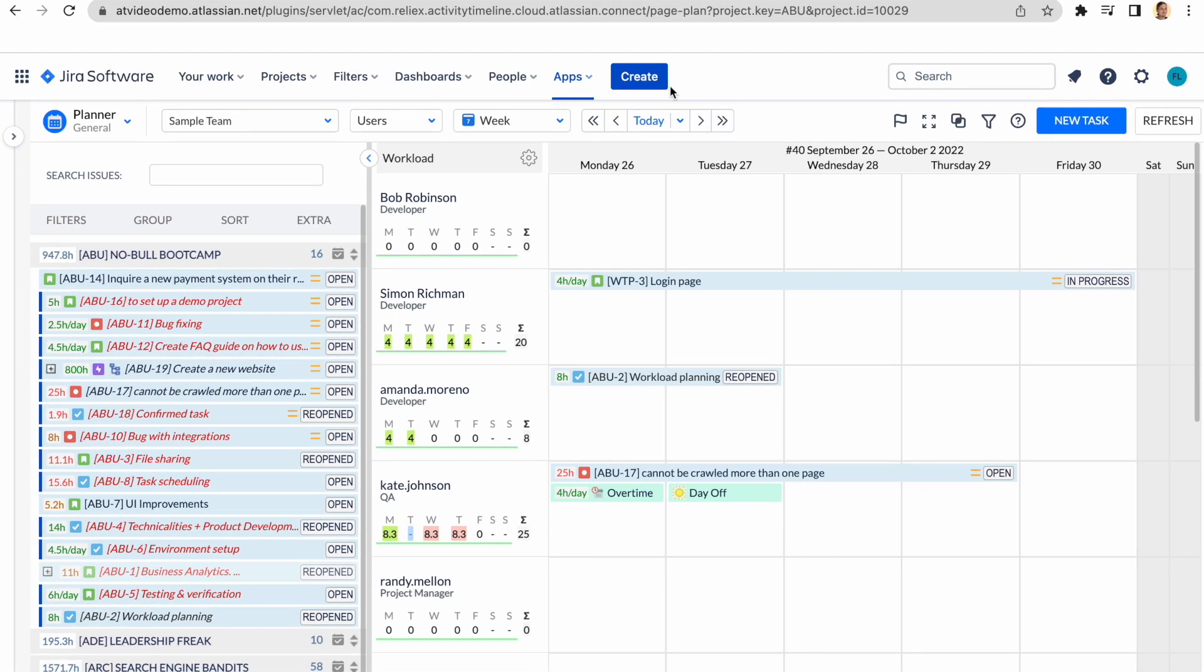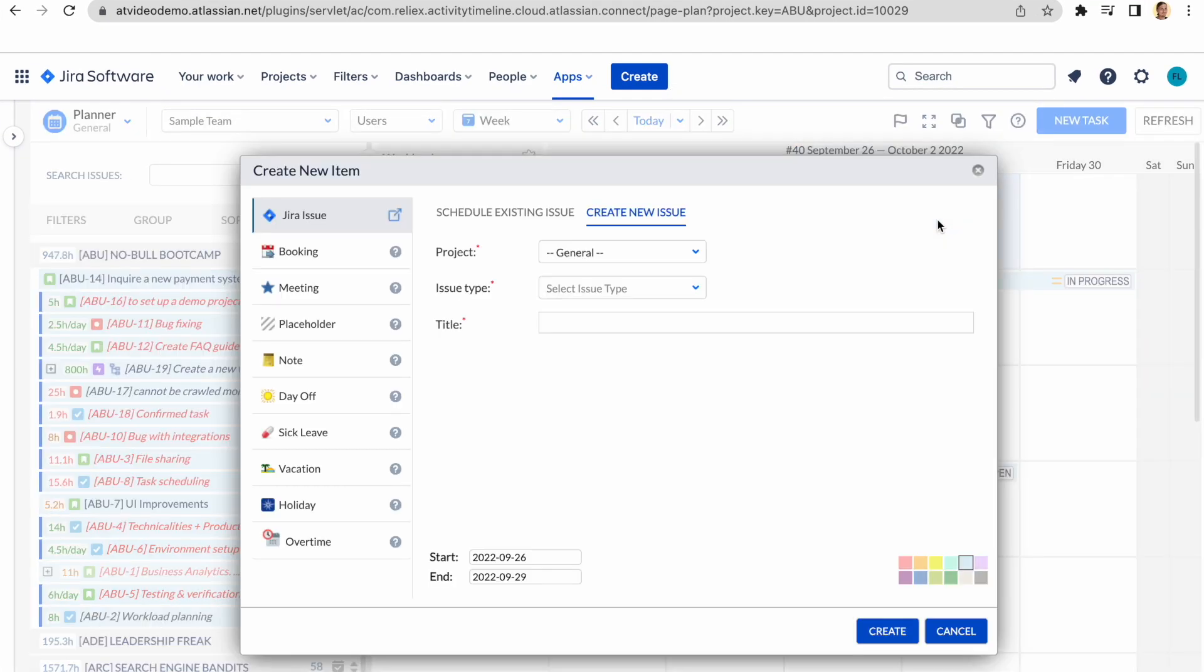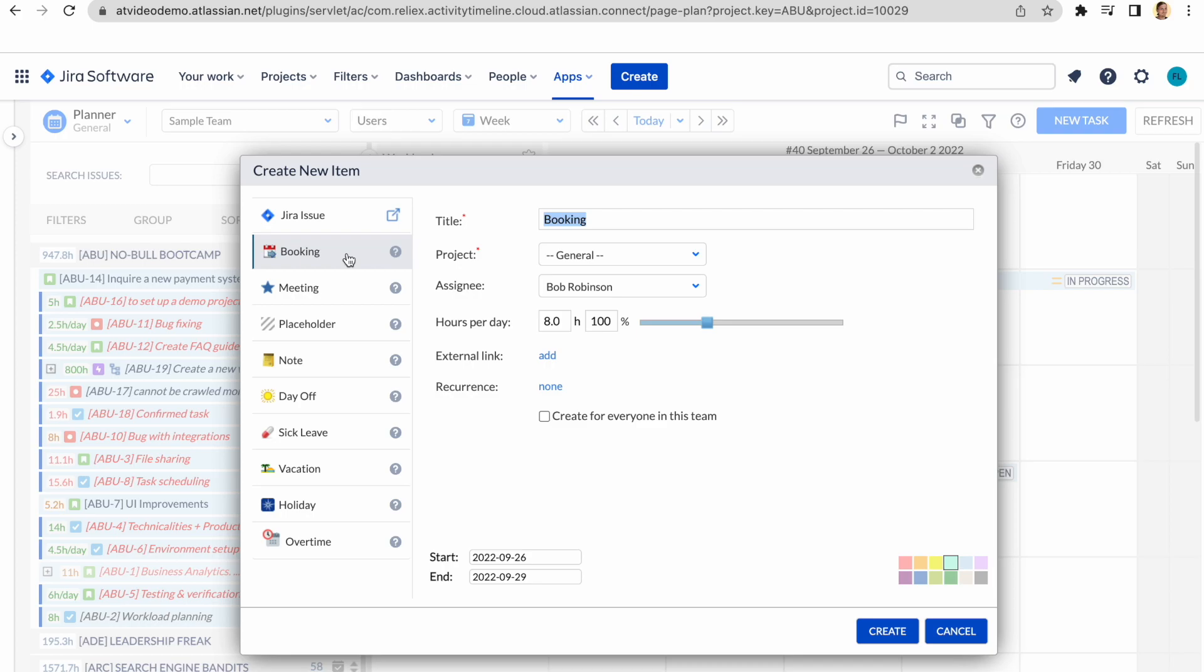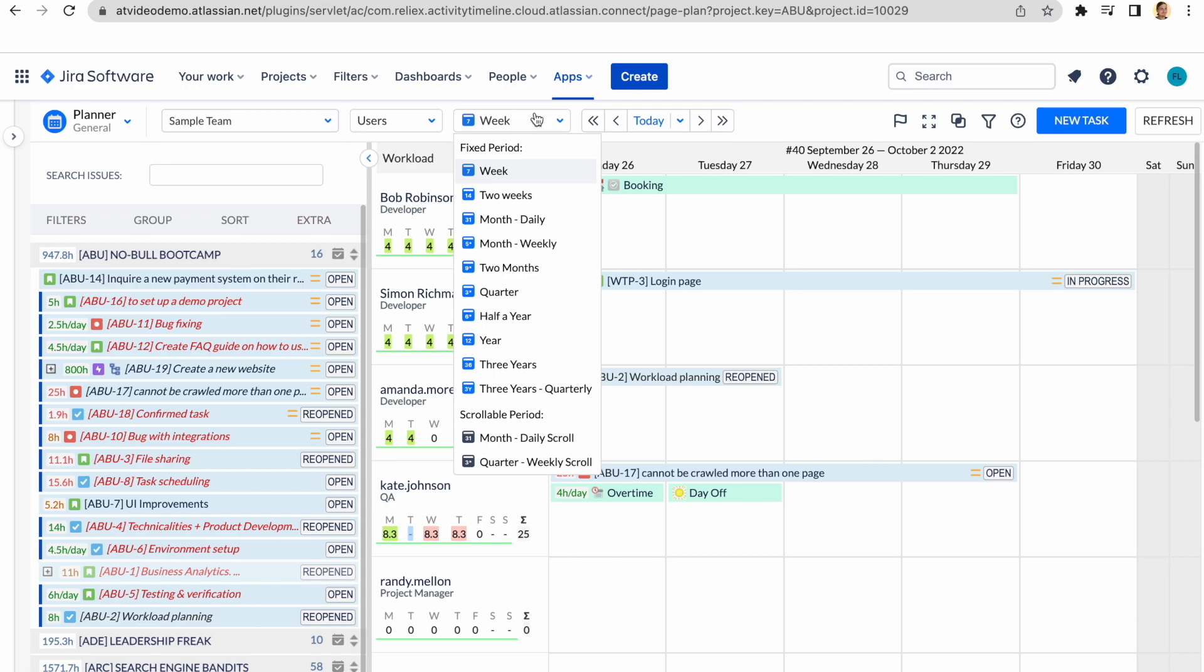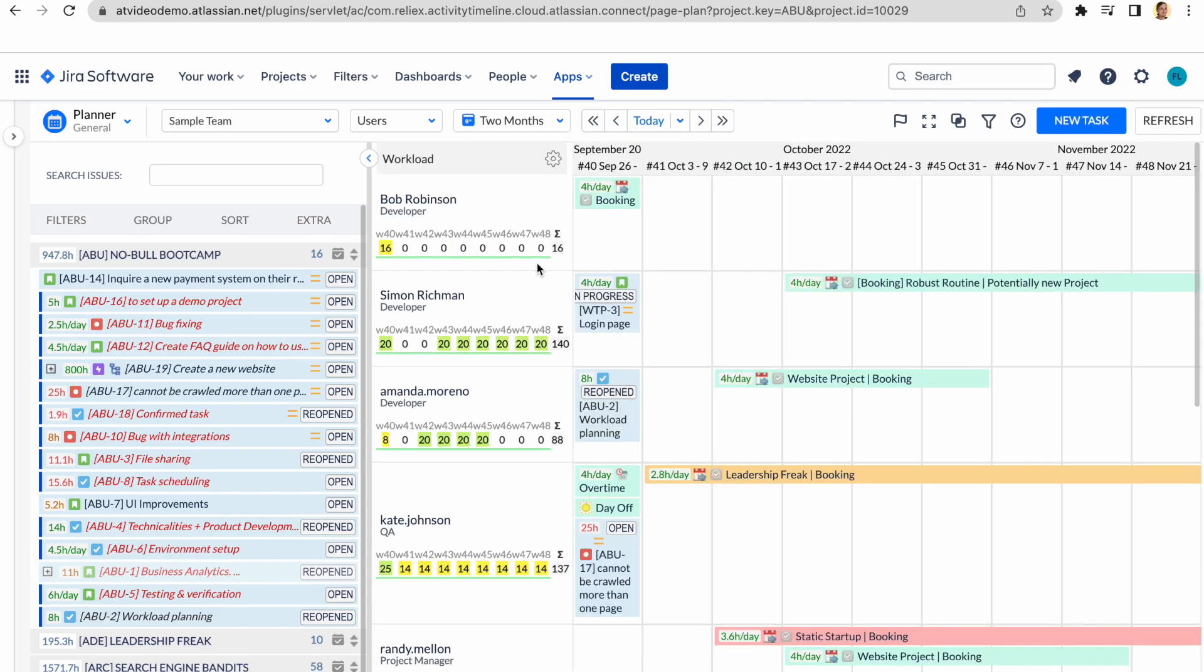In this video, we would like to focus on the booking event type. The idea behind this event is to quickly allocate a person to a project or activity for a certain amount of time per day, or as a percentage of the capacity. We believe this is especially useful for long-term planning, when you may not have all the Jira tasks created, but you'd like to forecast the need for resources a few months ahead.